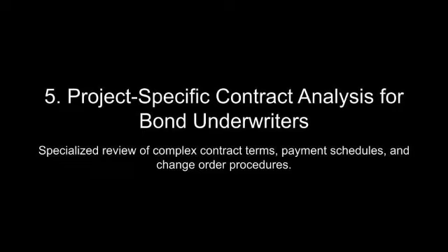Integrating contract analysis with contractor financial assessments involves mapping payment schedules against projected cash flows. This process requires an understanding of the interplay between payment timings, operational costs, and external financing needs. For instance, underwriters must evaluate whether a contractor's reliance on lines of credit to bridge cash flow gaps introduces excessive financial strain.